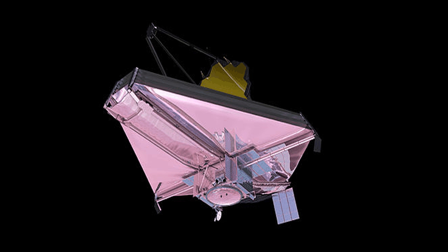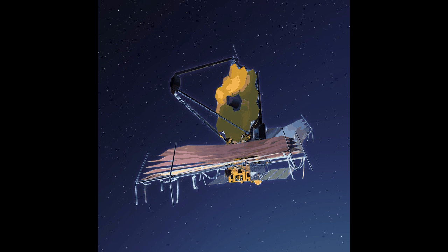In summer 2010, the mission passed its critical design review with excellent grades on all technical matters, but schedule and cost slips at that time prompted Maryland U.S. Senator Barbara Mikulski to call for external review of the project. The independent comprehensive review panel chaired by Jay Cassani found that the earliest possible launch date was in late 2015 at an extra cost of $1.5 billion.